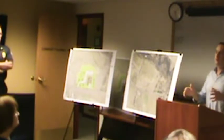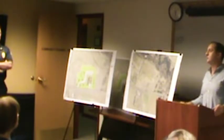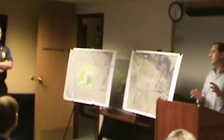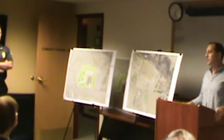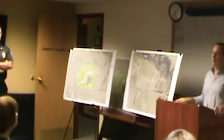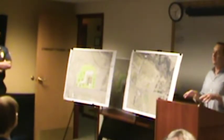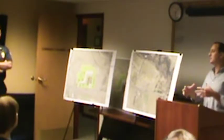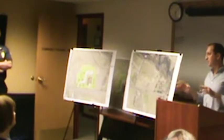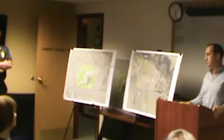For a budget update, with that town vote, the project budget got an additional $855,400. So the total project budget went from $2.98 million to approximately $3.83 million. We have a construction budget within that total project budget of $2.8 million. We're currently in this phase of design, in the estimate process. We actually just got estimates back today. We still have to dig into them and confirm scopes and quantity, but we're tracking on budget on that $2.8 million construction budget, so it's great news.